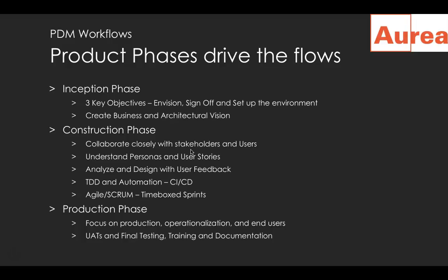The focus here is on production and operationalization versus construction or building or design or analysis. So the kind of workflows there will be very different. This is a phase where we want to do our final testing, UATs, documentation, training. That's where we are really at a good place where we can either do video documentation or other web-based documentation for the users.